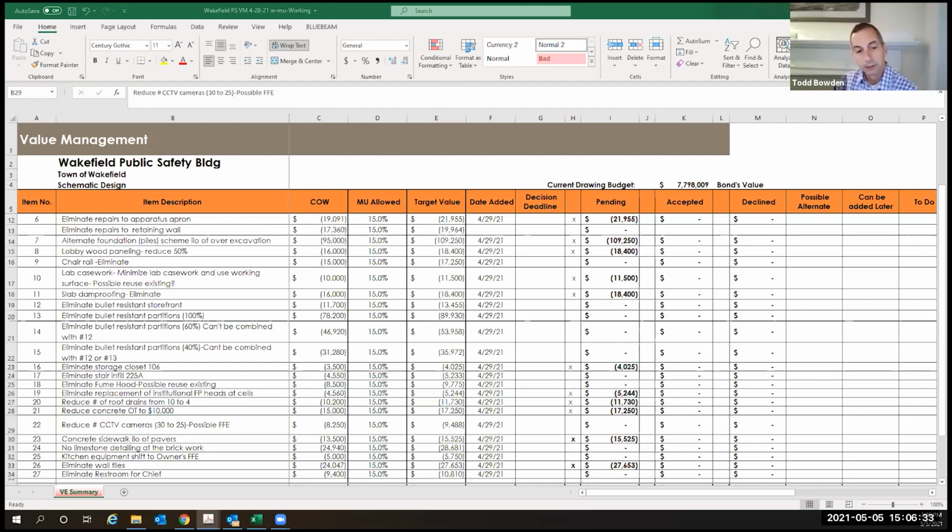So that's the question. Does that price per camera include the infrastructure or is that covered under electrical? Would that price include the infrastructure? That would be probably 6 times that amount, right? This is just a 5 camera reduction instead of the 30 camera. Oh, no, you've got $1,650 per camera. I assume that includes the camera. It does. Right. I'm not sure how Root carried the conduits and stuff in there, but I'm assuming it's going to be separate. That's the wiring and the device. Yep, for the 1600. So we should leave some money in there for the wiring and not take out everything.